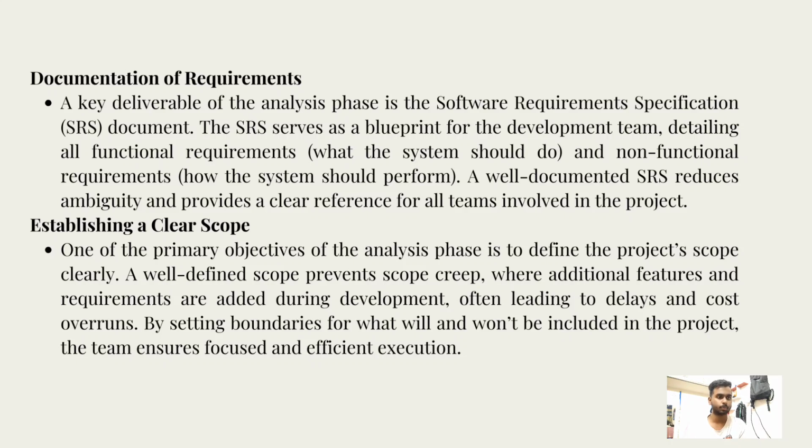Establishing a clear scope. One of the primary objectives of the analysis phase is to define the project scope clearly. A well-defined scope prevents scope creep, where additional features and requirements are added during development, often leading to delays and cost overruns. By setting boundaries for what will and won't be included in the project, the team ensures focused and efficient execution.